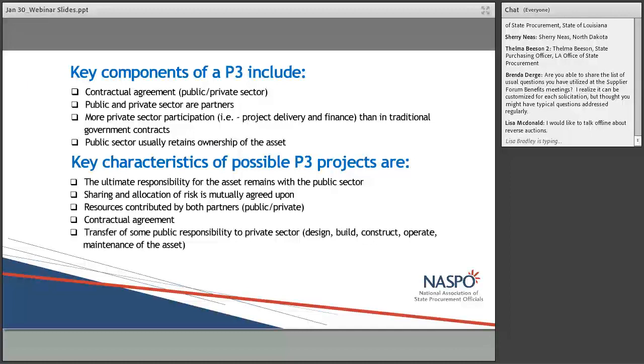After that, we do RFQs, but in this case, the RFQ is a request for qualifications, by which we go out to the industry and they respond to certain specs and overall requirements, and we're then qualifying based on evaluation criteria that deal with more experience and a slight technical approach. It somewhat resembles a two-step bidding process where you're qualifying and downsizing, in this case, shortlisting. Then after we shortlist, we get to an RFP, and the shortlist will receive the RFP and respond to the specific requirements, which are truly fleshed out and can be very lengthy and very broad.